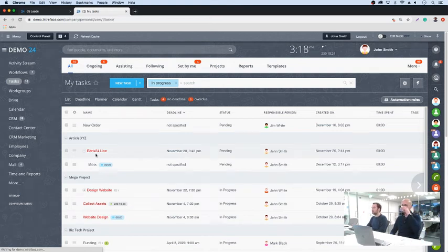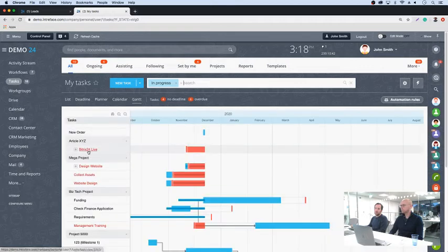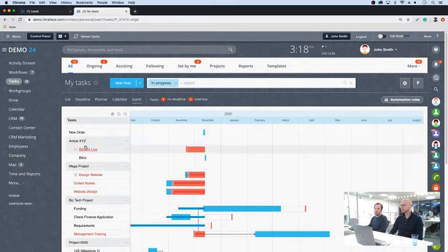This is a good way to work, particularly on projects. We tend to group them up in phases, so we would have a phase 1 head task, and then multiple subtasks below that, and then phase 2, and the same. Once you do that, when you look at the Gantt chart view, you can clearly see a roadmap for your project based on a head task and subtasks. Everything will be stepped along the particular project path.